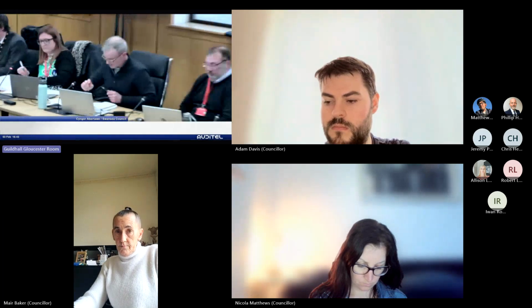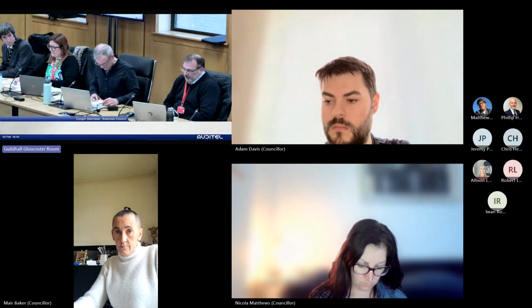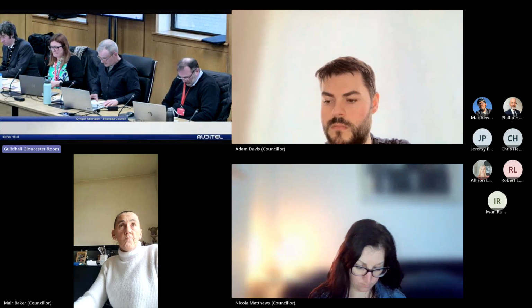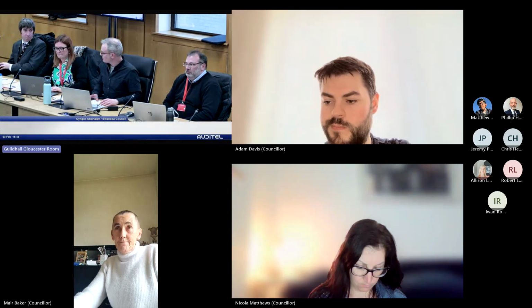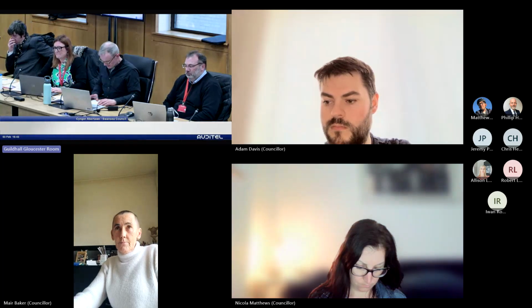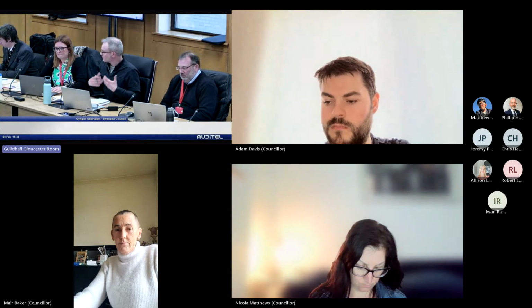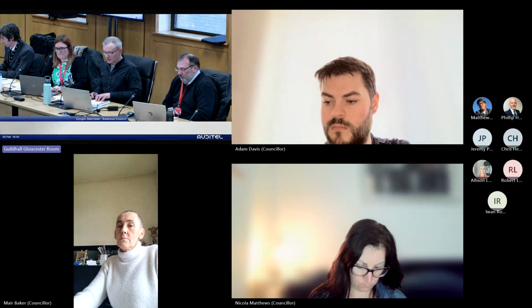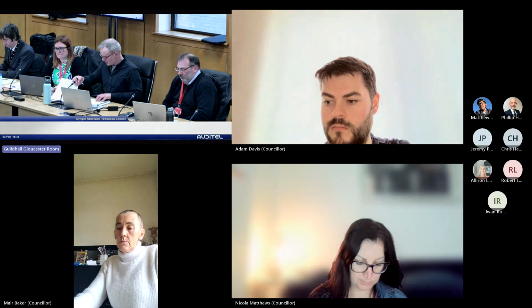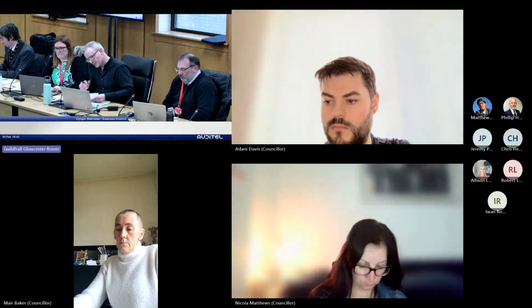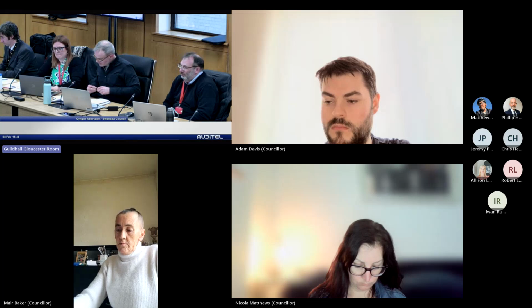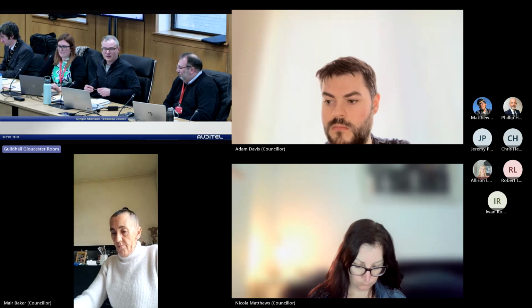Thank you. Okay, yep, thanks, Hayley. Just to say a little bit more about the structural comments. If there are structural concerns, they would, in the first instance, be picked up by the council's building control department, and as a listed building, they would liaise with myself if there are concerns raised. But as conservation officer, I haven't had any structural issues raised with me. There was a question around monitoring and enforcement. There's obviously a raft of conditions in the agenda report, 12 conditions in the report. They all need to be complied with before further work commences.